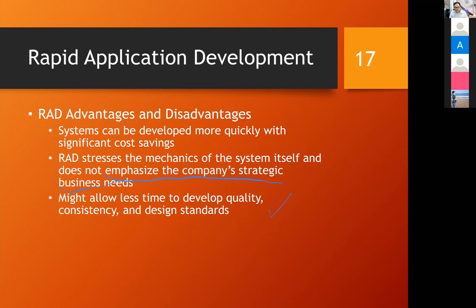But if you ask me why doesn't everyone use RAD, the reason is that some organizations are not ready to use RAD. Their users may not have time to be with you all the time, and you may not have enough system analysts or programmers to break the task into small teams.